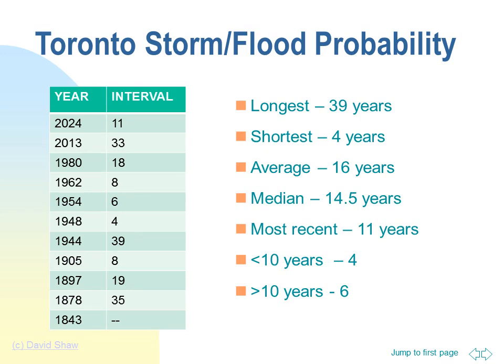The average interval over 181 years of records is 16 years. The longest is 39 years, and the shortest is 4 years. The median is 14.5 years. What interval would you use in a cost-benefit analysis? You might think to ask AI. If you ask AI, it will tell you, due to the sequence's lack of a clear pattern, a sensible approach is to make an educated guess based on known data if no other information is available. The PMBOK would call this expert opinion.